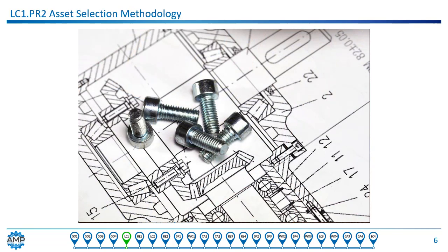How can you know the assets you're acquiring are going to meet your specific needs? Developing a standardized user requirement specification, or URS, is vital toward realizing met needs. All end users and other stakeholders in the organization should have the opportunity to input to the URS. Remember, the more precisely and thoroughly the needs and wants are stated, the closer the end result will be to ideal. Then a URS gets translated into reality by the functional requirement specification, which says how the needs will be met in terms of actual parts, assets, and systems.